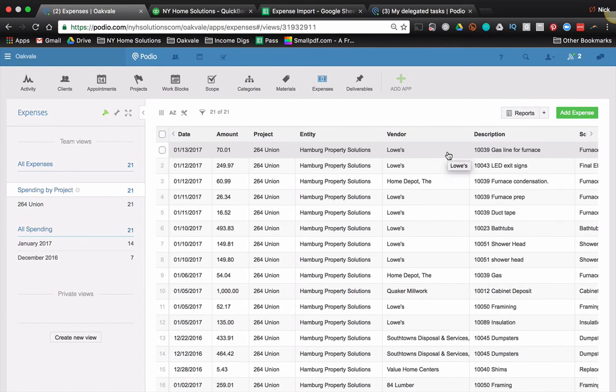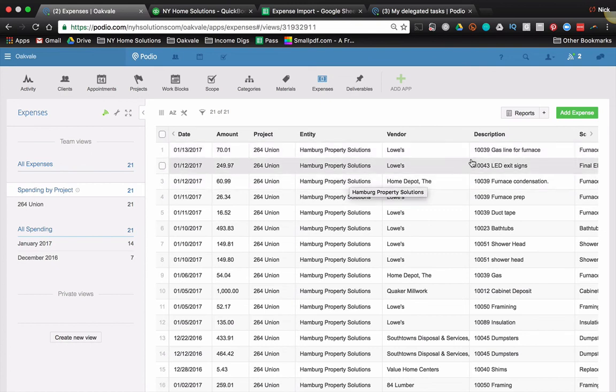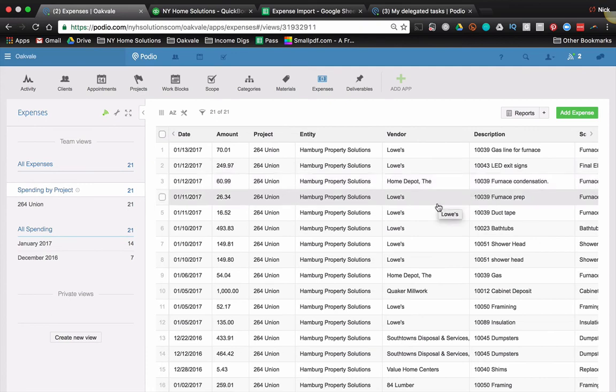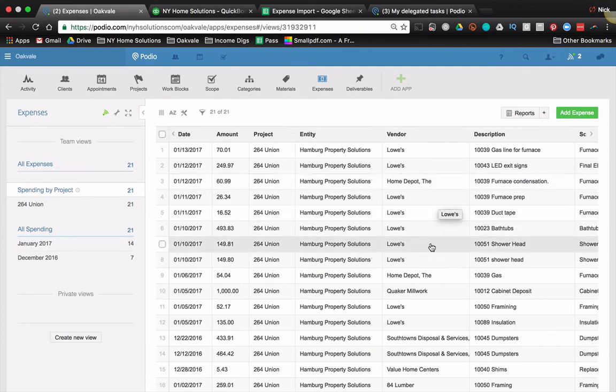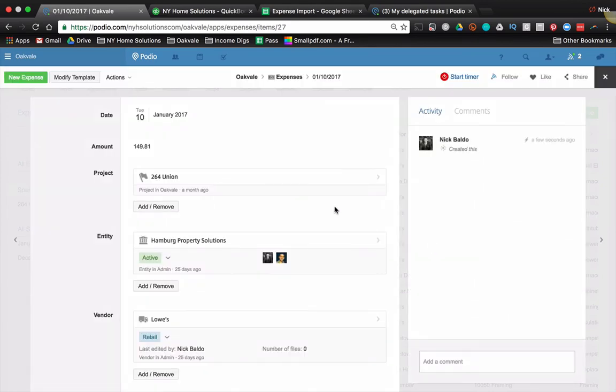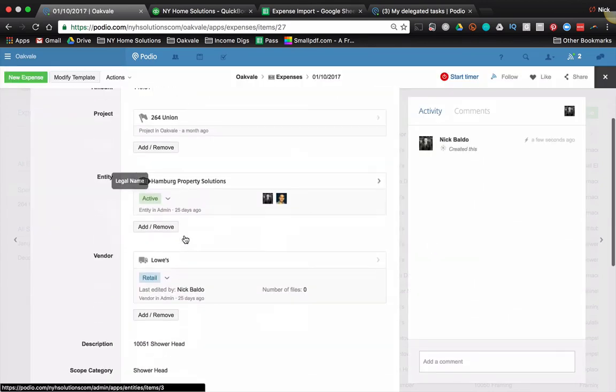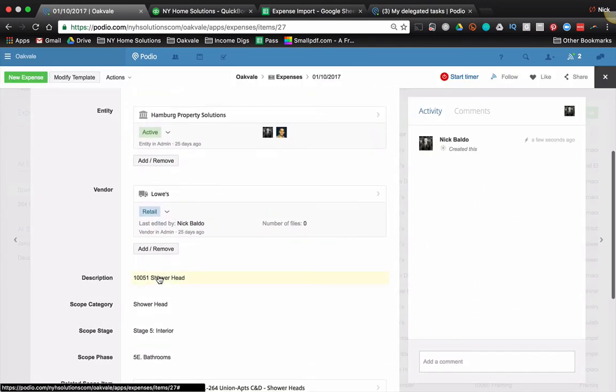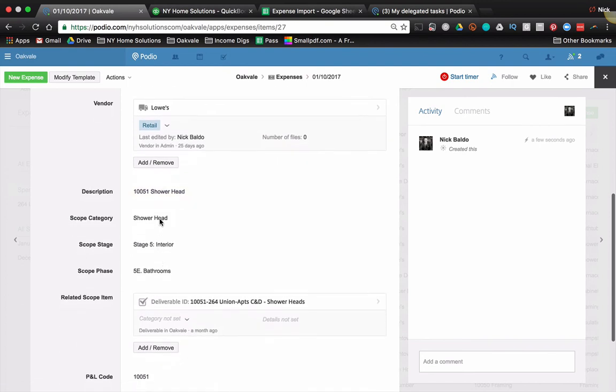So this took me, while explaining, it probably took me five minutes and we just do this every week. And that way we have an updated view of how much we're spending on a project. So let's just take a look at the showerhead. So here's an expense from QuickBooks, one forty-nine eighty-one, the project, the entity, the vendor, and the description, everything flows in the related scope item.